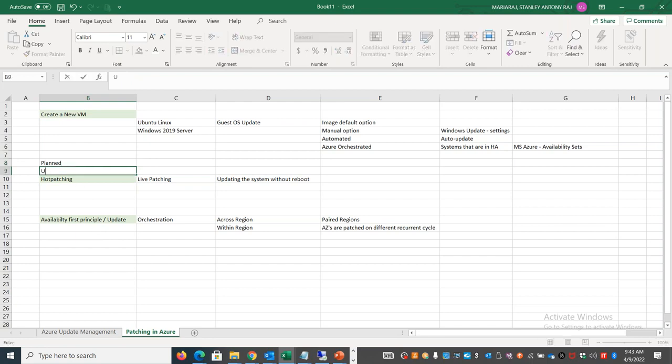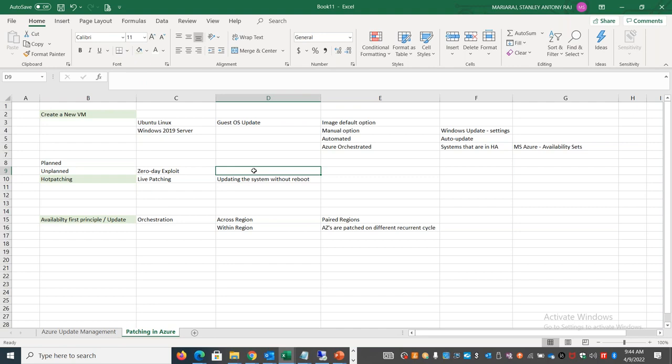And suddenly a critical update or an important update comes in, and we create an emergency change request or expedited change request and get it fixed, because important security updates might come anytime. There might be zero-day exploit patches, like the recent log4j vulnerability. Most organizations have to fix it without delay, the same day or the same week. So unplanned patches and updates can come anytime.